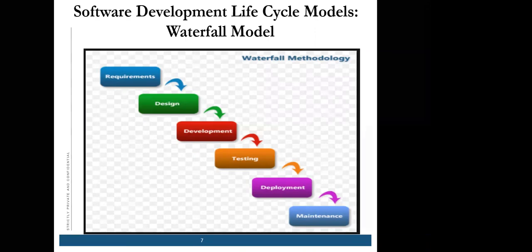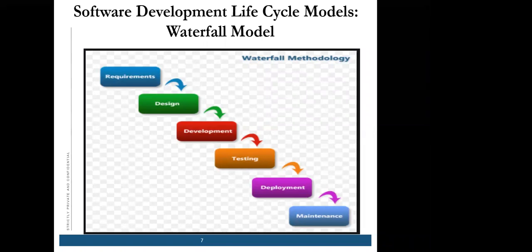Yeah, just to add, Chavi. Yes, you rightly said, that's correct. The output of the requirement will be the input for the design, as you said. So there is a dependency one after the other. So once the requirements are freezed, you can't go back. So that is the limitation, I would say, of a waterfall model. And a client has to be very clear when it comes to requirements and so on when we follow this kind of a waterfall model.